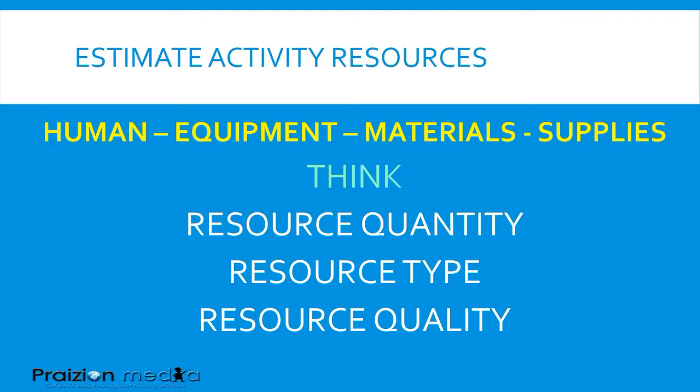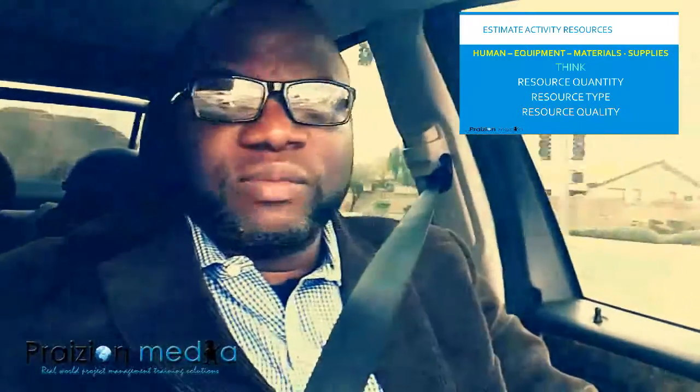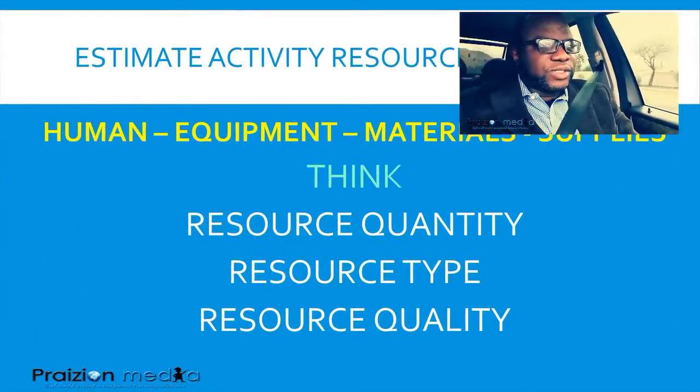Now, this will change in future editions of the PMBOK Guide, but right now this is where it is in time management, estimate activity resources. How do you estimate the resources you need on the project? Well, first of all, you need to know the project requirements. You need to know what's in the contract. If there are any specific dates that you need to meet, you need to have this in mind.